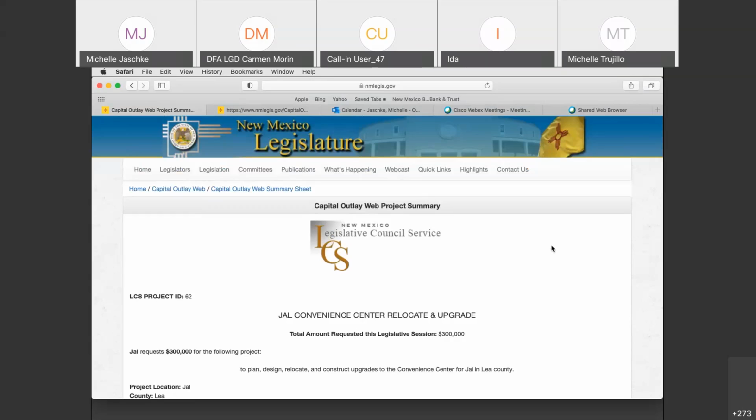Oh, that's a great question. I don't know if Wesley wants to address that. There are guidelines. There are a couple of questions in this form too that deal with that, asking about project readiness and noting that in order for a state agency to certify this project, they have to be reasonably certain that you can expend 5% of the money within 6 months and 85% of the money within 3 years. So for a construction project, the expenditure period is 4 years.